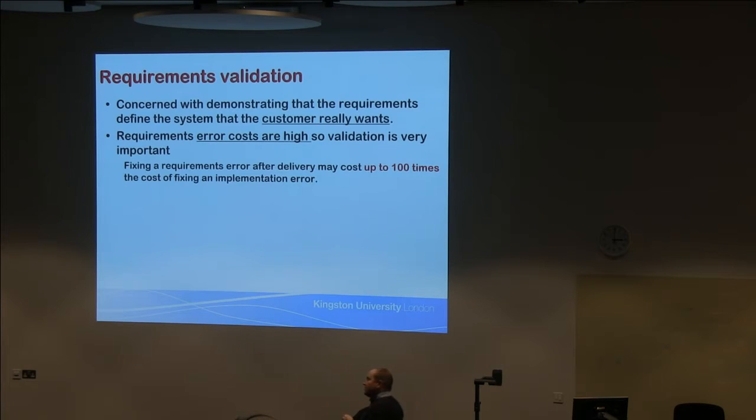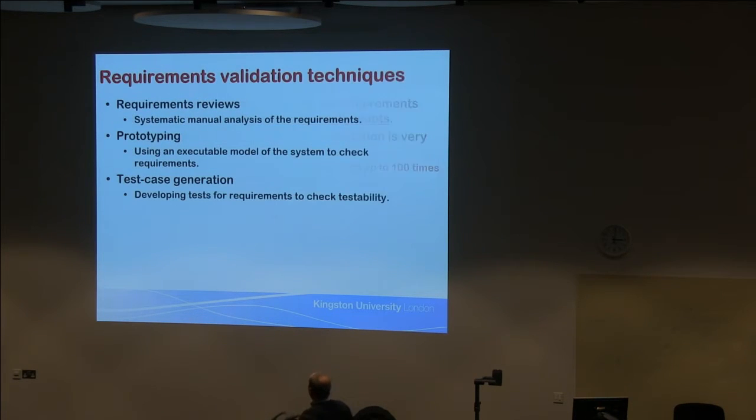Now, requirements validation is all about determining, yes, these are the correct requirements. You know, the requirement is a tyre with a rope around it tied to a tree, not a tree stump or all those other pictures. If you get this wrong, fixing it after you've written the software is not cheap.